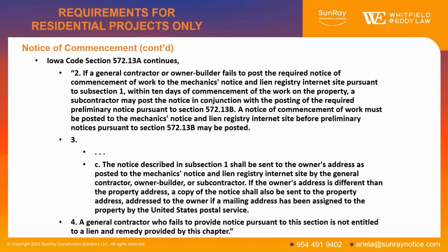So as a subcontractor, that's one thing you want to check as well: when you get on the project, has there been a notice of commencement filed by the general? If there is, great, you don't have to do anything. If there hasn't, then you need to file it right away. And then you'll notice here in the middle that the notice of commencement has to be sent to the owner's address, okay, by the general or sub.